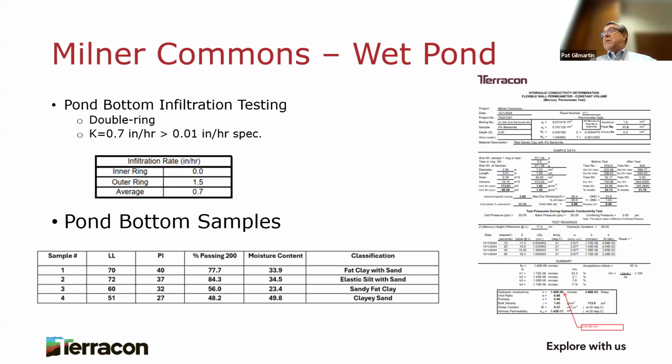We talked about a geomembrane liner because it would have been probably, no worries, don't have to mess with bentonite. And I don't know if this is true or not, but the project team told us that if we switch from a no liner or soil liner option to a geomembrane liner, we're going to have to re-permit it with the City of Raleigh, and we don't have time for that. I don't know if that's true.